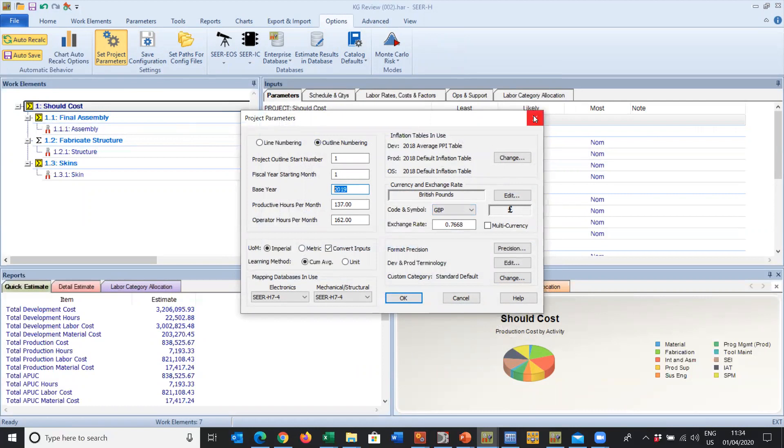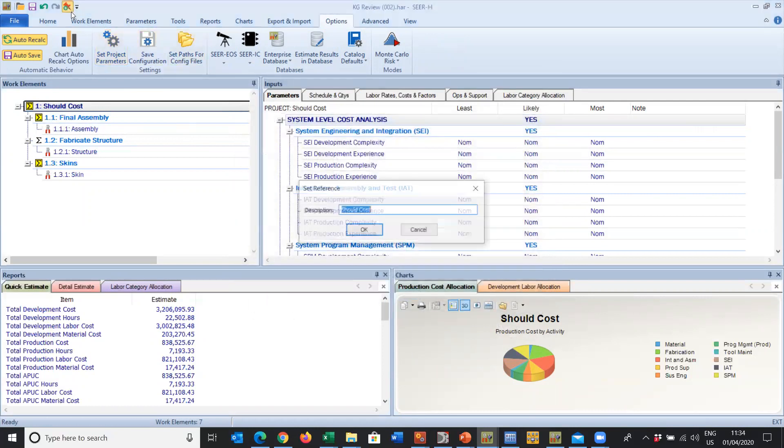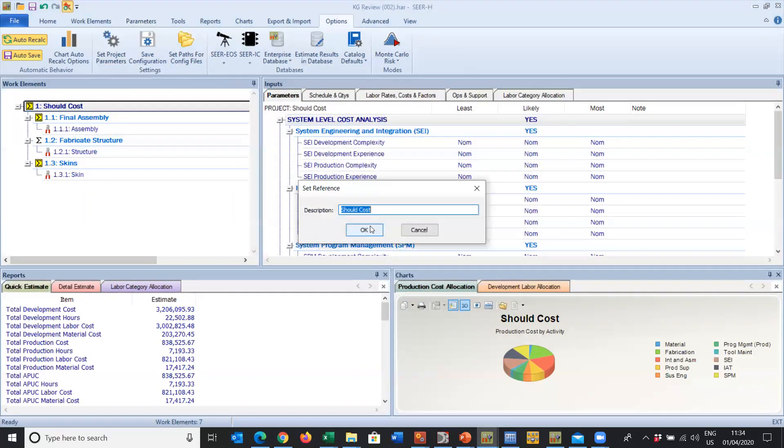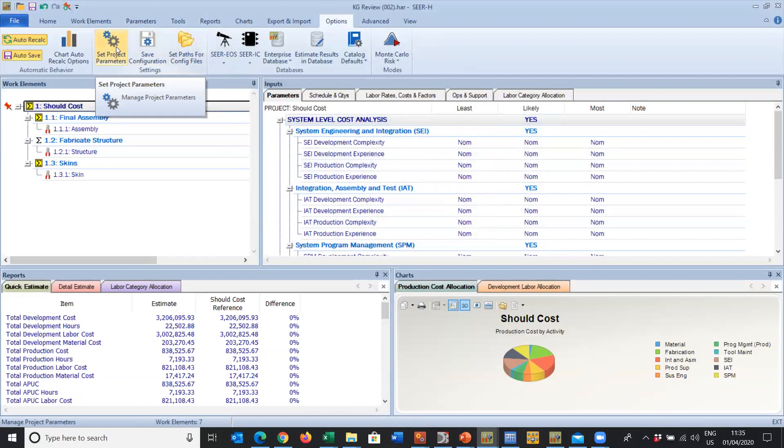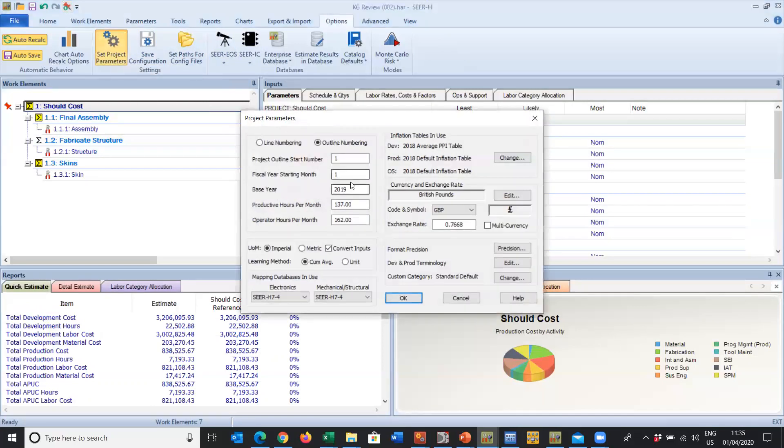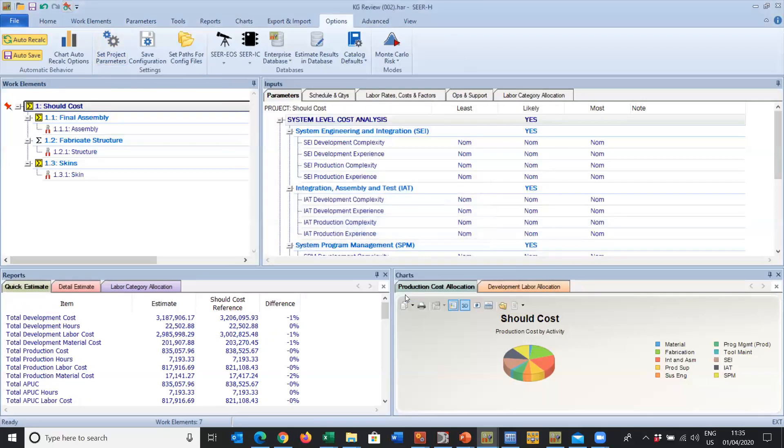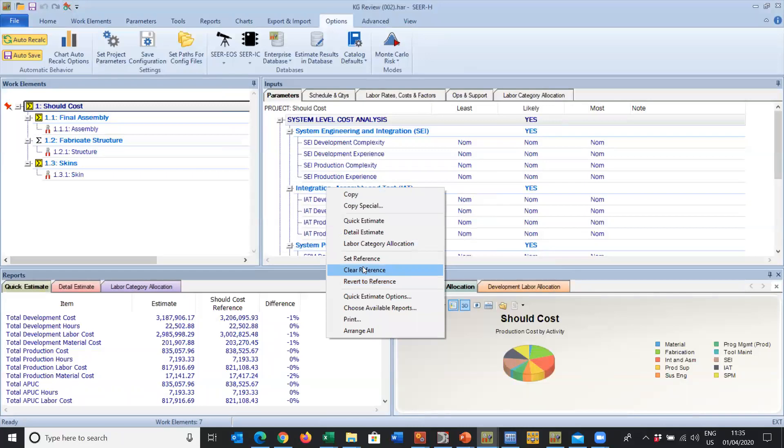Depending upon the currency that you select, the labor rates will change, the base year changes, and so on. I'll set a reference, click on Okay. Now if I go into Options, Set Project Parameters and change the economic conditions to 2018, click Okay, you'll see there's a variation in cost. This is a reflection of the labor rate changing and the inflation tables also taking into account.